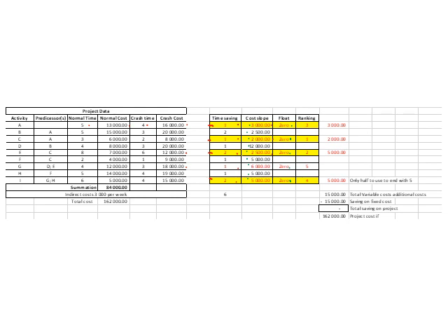Okay, so from your cost slope you rank your items. Item C has the least cost, so it's ranked number 1. Item E is ranked second because it has the second lowest cost slope, and rank number 3 is item A with 3,000.